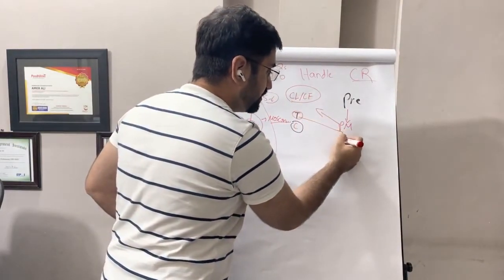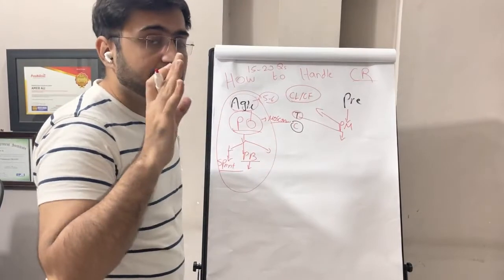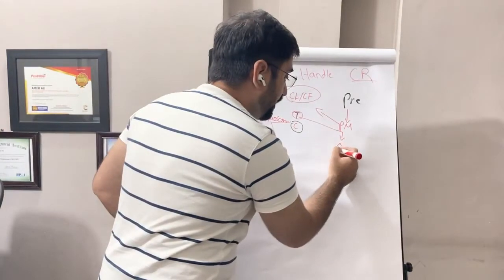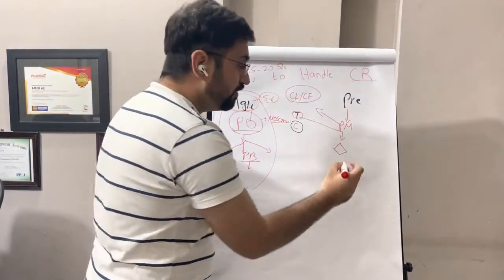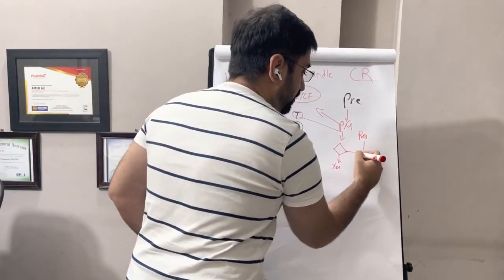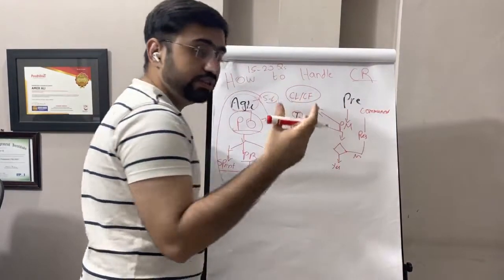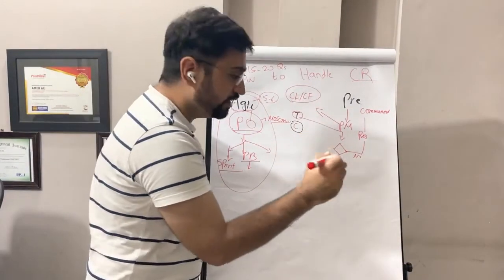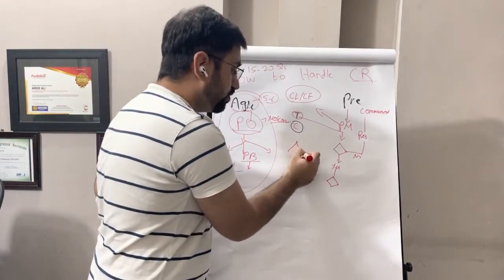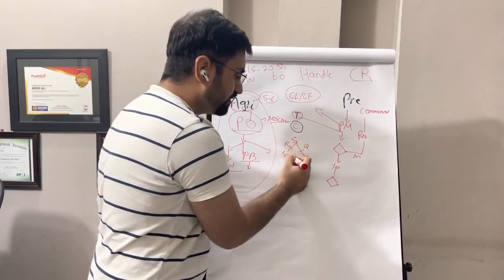The PM evaluates the change. If the change is important, it is needed, and it is affecting the deliverables. If the change is not affecting the deliverables, the change is not required. So he will do analysis here. If the change is affecting the deliverable, the change will move to the next step. Otherwise, the change will be rejected, okay, and communicated to the stakeholders who requested it. So now let's say the change is affecting the deliverable. The project manager will evaluate the change on, of course, scope, schedule, cost, quality, resource, risk and other things.